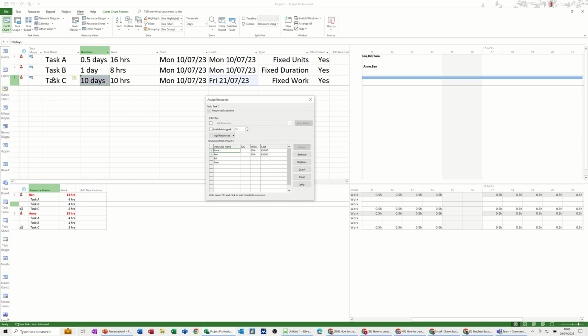So this one is obviously a bit more involved than the other two, but normally you would be doing this with external contractors. You might not be bothered with actually allocating an individual resource to that, and it would be more to do with that external supplier dictating how many men was needed for a task. They would pay for a job, so the money would be paid maybe as a fixed price, and then you're just basically buying 10 hours. But if you did want to do it like I've done there, you can see how it works and the impact of it.